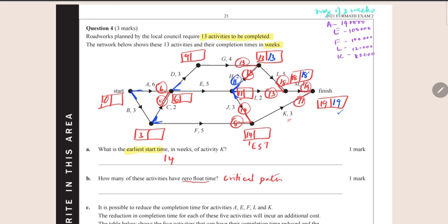So going along I, 18 take away 2 is 16. And 19 along K, 19 take away 3 is 16. And then along J, 16 take away 3 is 13. Of these three values, the smallest value is 11, and that is my backward scan value.